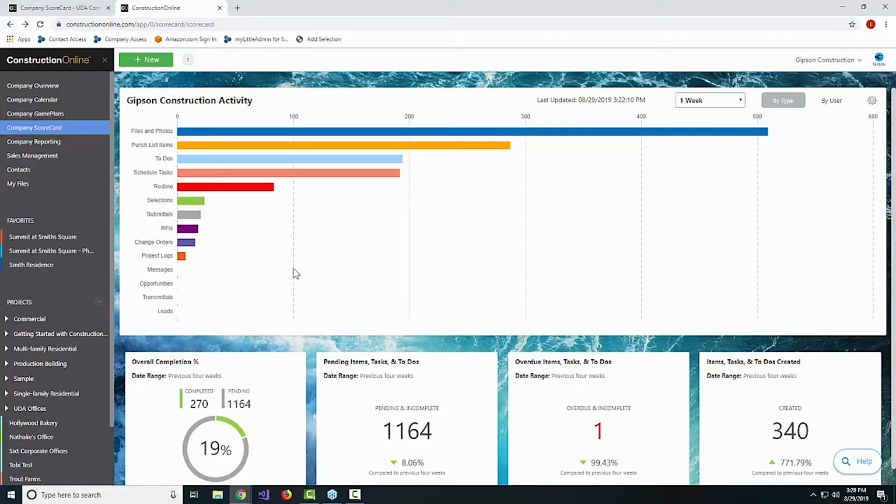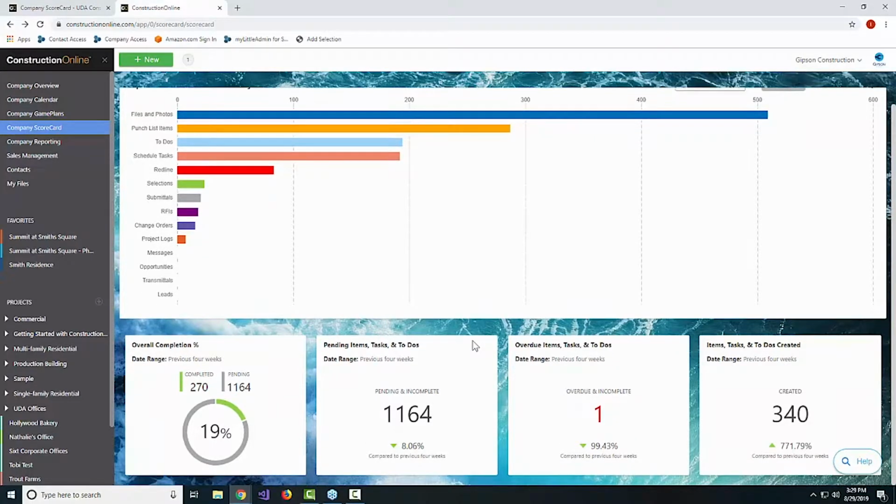Well, again, what that tells me, if I'm getting the right view of my projects, is that my team is probably going to be a little bit late wrapping up all the projects that I've got on deck right now, which in turn means that they might be a little bit late getting started with the next projects. And so again, that's going to change the tone of the conversation that I have, not only with my team members, but it might also allow me to proactively reach out to my upcoming clients, the projects that are in my backlog.